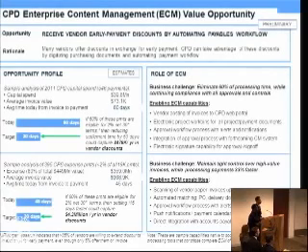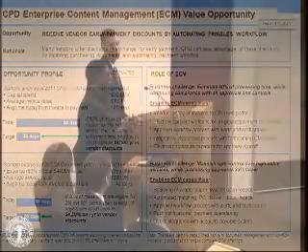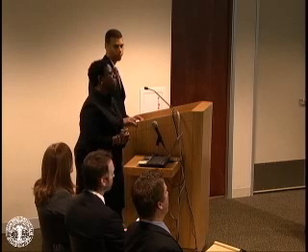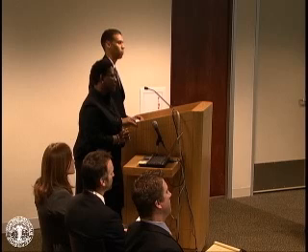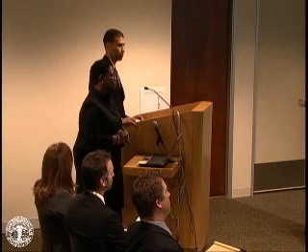Tanya, are most of our contracts offering 2/10 net 30 today? I'm not sure. Yeah, I'm not sure, but we typically pay our contracts between 60 and 90 days. So what we're going to do is reach out to our contractors to ask them if they would allow us to participate in a prompt payment initiative where they'll give us a discount if we meet it in 30 days. In the commercial world, 2/30 is tough to get. 2/10 net 30 is usually more standard. So I would challenge whether or not you could actually get 2/30. But we should look into that.